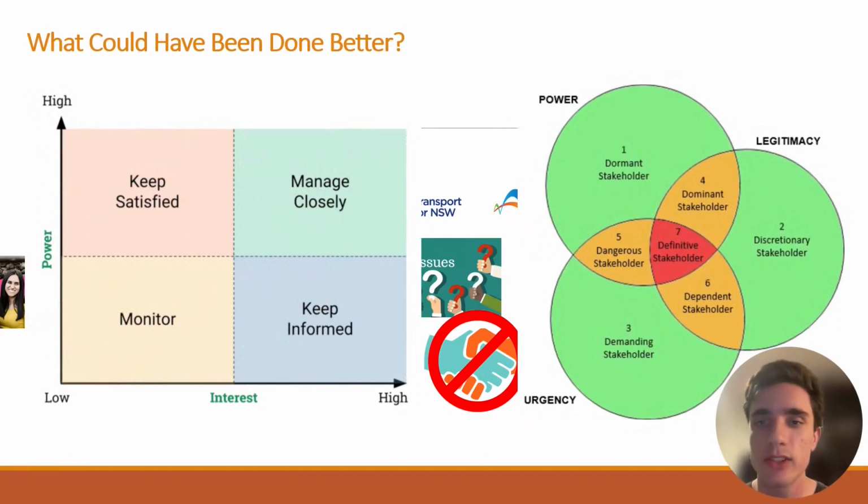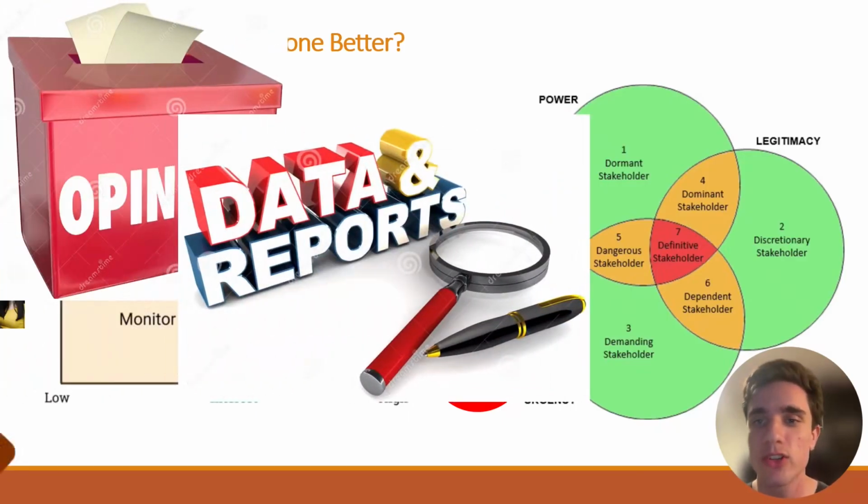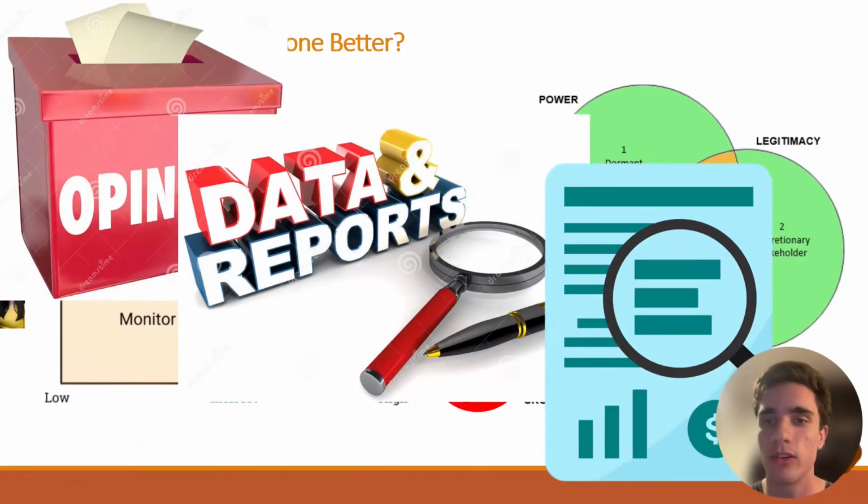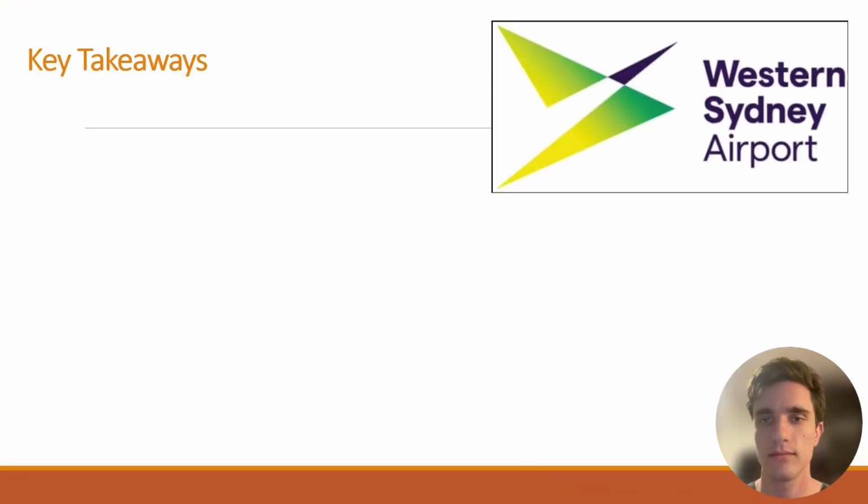The power interest grid is useful for identifying those who need close management, but salience can help the project understand the importance of groups with low formal authority. Third, the project should use a public "you said, we did" or "why not" register. This would show which community suggestions were adopted and which were not, and why. Finally, there should be a strong interface between governance, airports, the airport facility, flight path, road, rail, infrastructure, and more.